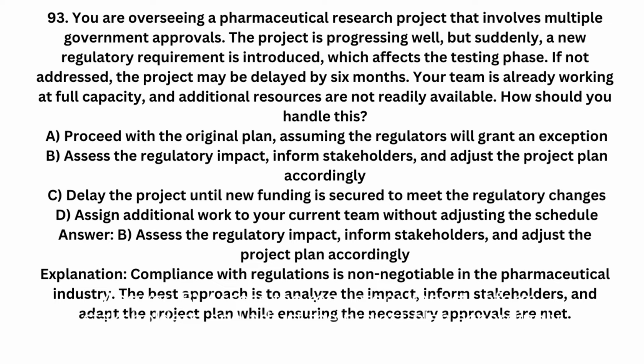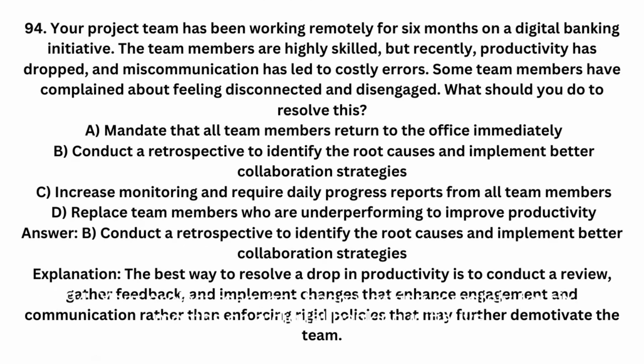Answer. B. Assess the regulatory impact, inform stakeholders, and adjust the project plan accordingly. Explanation. Compliance with regulations is non-negotiable in the pharmaceutical industry. The best approach is to analyze the impact, inform stakeholders, and adapt the project plan while ensuring the necessary approvals are met.